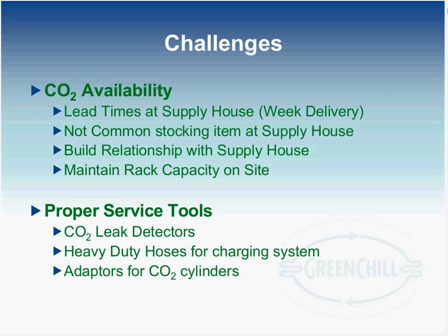As an organization, we've decided to keep a whole rack supply at our stores to make sure that if we have a refrigeration go down in the middle of the night and we do have an accidental release, that we can save our product by getting the rack back up and running as soon as possible. In one situation, we were lucky enough to have as our tenant there on site a refrigeration supply house, and we did build a relationship with that supply house, and they're actually maintaining our CO2 supply for us. So when at all possible, build relationships with your local supply houses, and they will manage the CO2 availability for you.